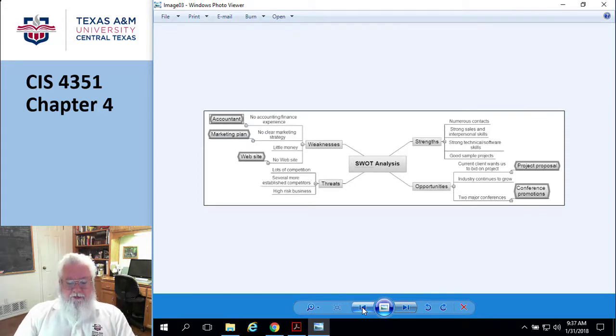Okay, so the charter is broken up into several sections. There's going to be a statement of work, and the statement of work is basically like an elevator pitch: this project is designed to do this. It should be relatively short. If it's more than an elevator pitch, about this much on the document, then you're probably putting too much into it. Then the business case, a very short justification of why we're doing this and why it's a good idea. Essentially, how you got to the idea that this was a good idea.